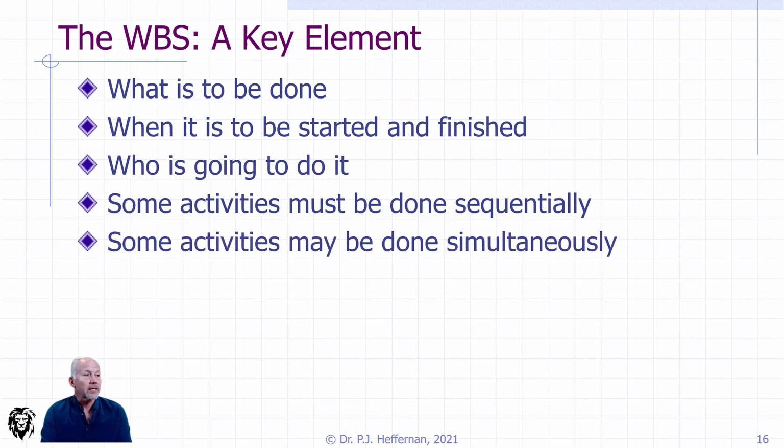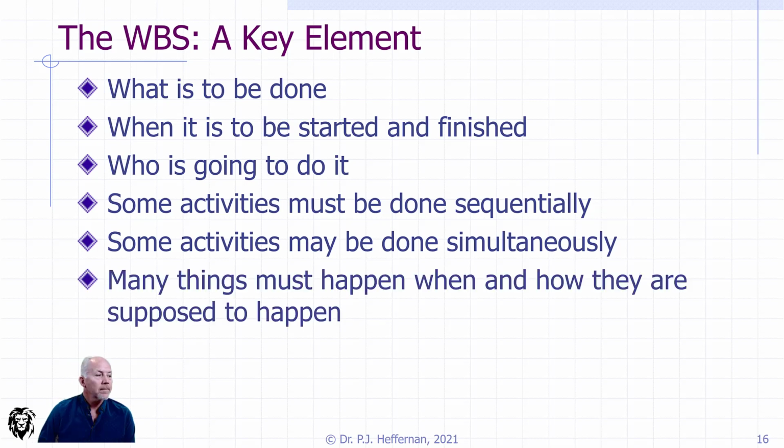It's possible that some activities may be done simultaneously. That doesn't necessarily have to come out here. If you identify what has to be done before it and what has to be done after it, as the schedule indicates things, it will allow for the schedule to keep things simultaneous. And if there are other constraints because of space limitations and stuff like that, then you can start to force those in. So lots to go on.